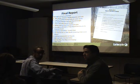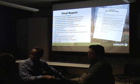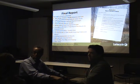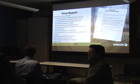Can I add one thing? As a training provider and a contractor, if you're removing asbestos, the contractor you choose must be DOS registered, and their workers must be asbestos accredited trained. Yes. And they must have hazmat. Yes. So that's a total of 72 hours of training.